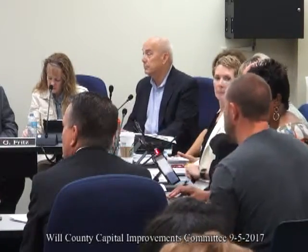Okay, great. I think that's a good point that you made, Jim. The substantial completion letter has things that we attach to it to make sure that we're all on the same page. One is the temporary C of O. The county comes through, inspects it, and anything that they see, landscaping would be one. We're not done with that. They acknowledge that, and we put it on the list to make sure that the final is all complete.